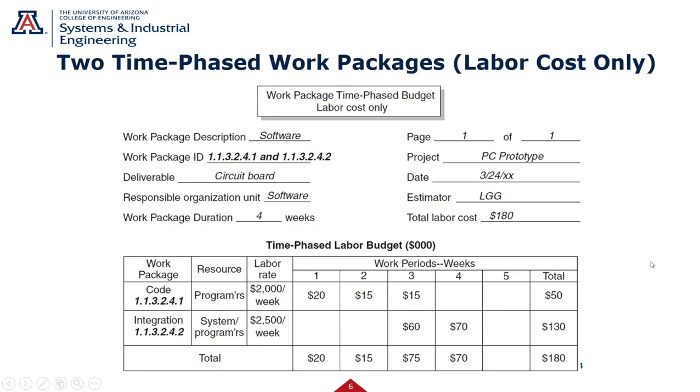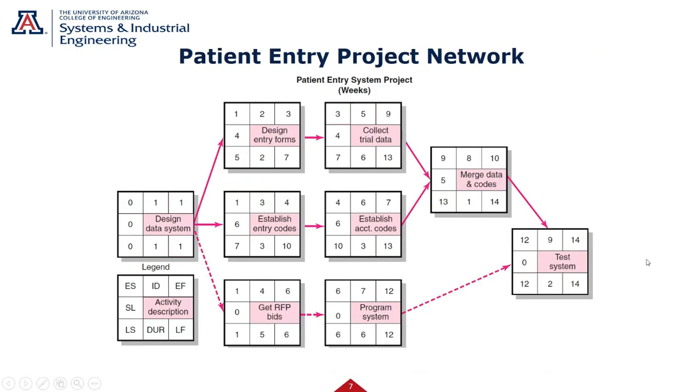A lot of companies will have a detailed sheet like this to figure out those costs and estimators. Now we're going to put it in, and then we'll go back to our EMR project just so you see some variation. Here might have been a project that took 14 time periods, I guess weeks, and we balanced that out. We can see the critical path through the zeros down here and so forth.